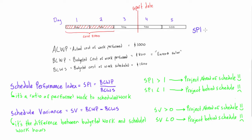So we'll have SPI equals BCWP, which is 800, over BCWS, which is 1200. This will give us a value of 0.67.